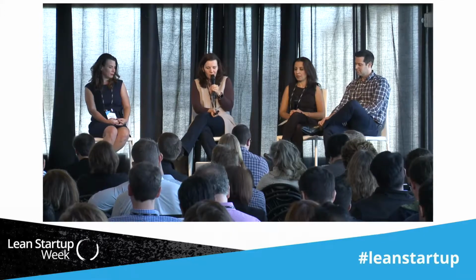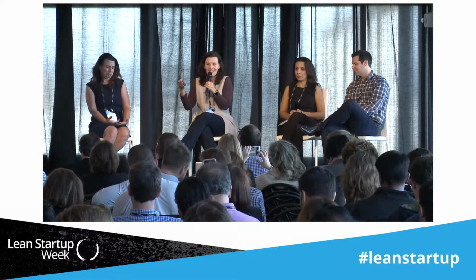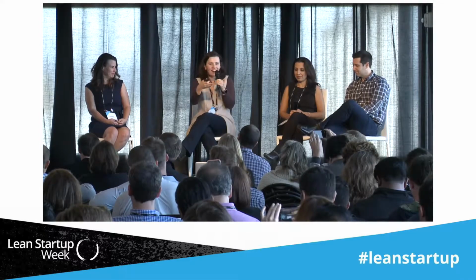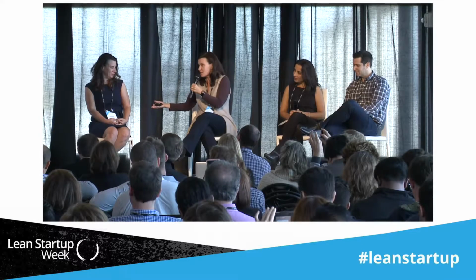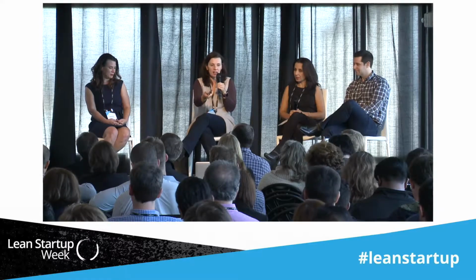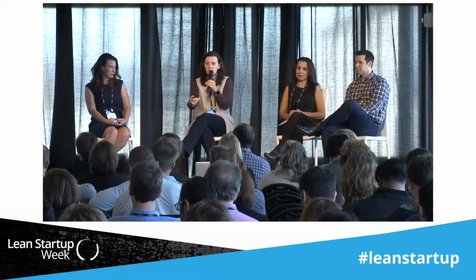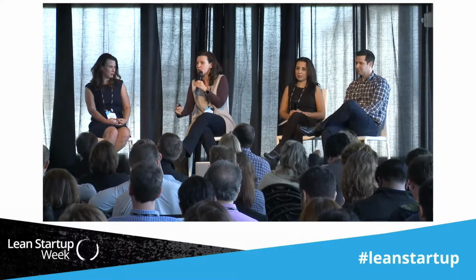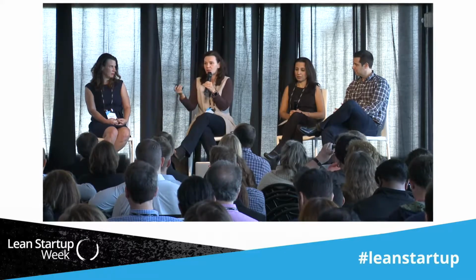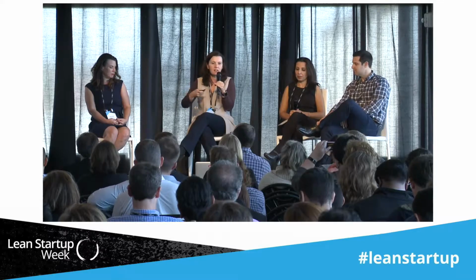And then finally, over 7 weeks, we had an approach, again, 7 weeks to redesign and get the product understood, like insights about what we were going to redesign, sketches about how we were going to do it, and then also the prioritization of what the product roadmap looks like. So we had insight using product data and ethnographic research working together to really get insight into what was important to our users. Then we got inspiration from looking at other products, and here we were not just looking at our direct competitors' products, we were looking at startups, and what enterprise startups were doing that was so delightful? What could we learn from a whole bunch of different experiences that were being built out in the world? We did a bunch of cycles of rapid ideation.